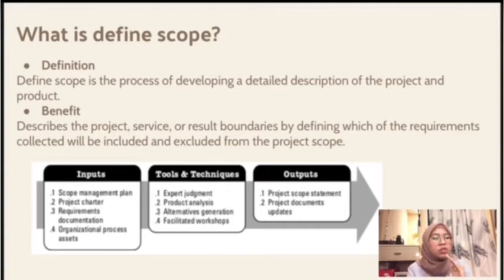During project planning, the project scope is defined and described with greater specificity as more information about the project is known. Existing risks, assumptions, and constraints are analyzed for completeness and added or updated as necessary. The define scope process can be highly iterative. In iterative lifecycle projects, a high-level vision will be developed for the overall project, but the detailed scope is determined one iteration at a time, and the detailed planning for the next iteration is carried out as work progresses on the current project scope and deliverables.